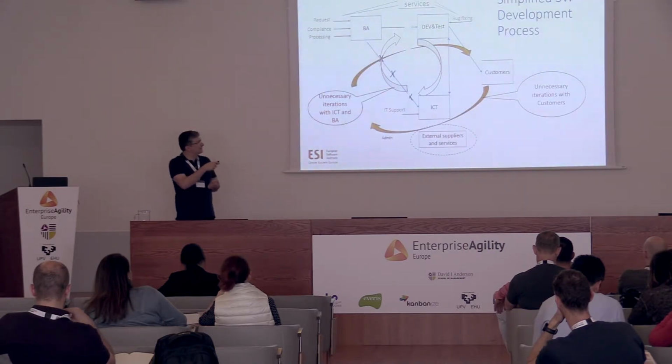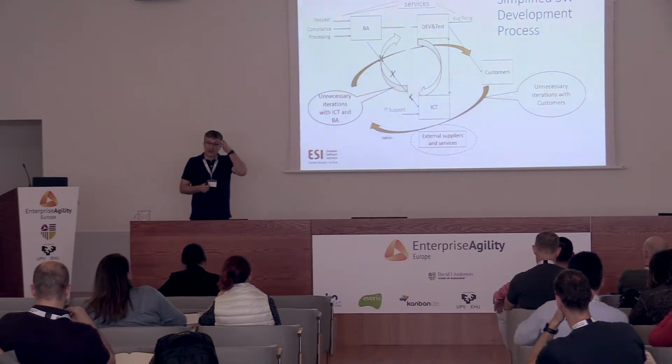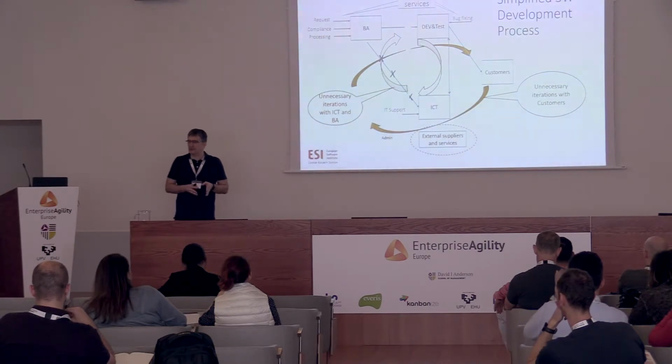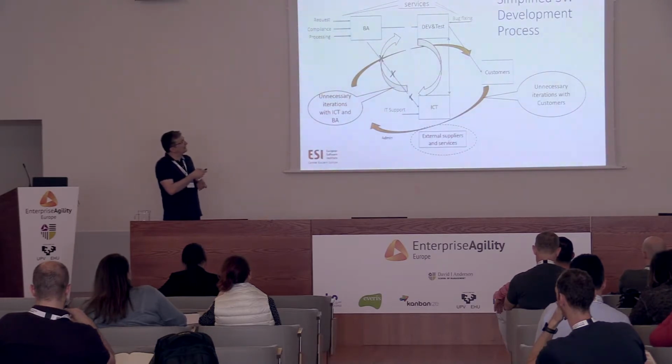And the first decision of the company, that was a very mechanical decision, was let's decrease work in progress here. And they established a policy that every request that stayed more than 3 months in the queue here would be retired. Of course, in communication with the client. So in this time, they deleted a lot of requests here, and some of them they sent back to the queue.